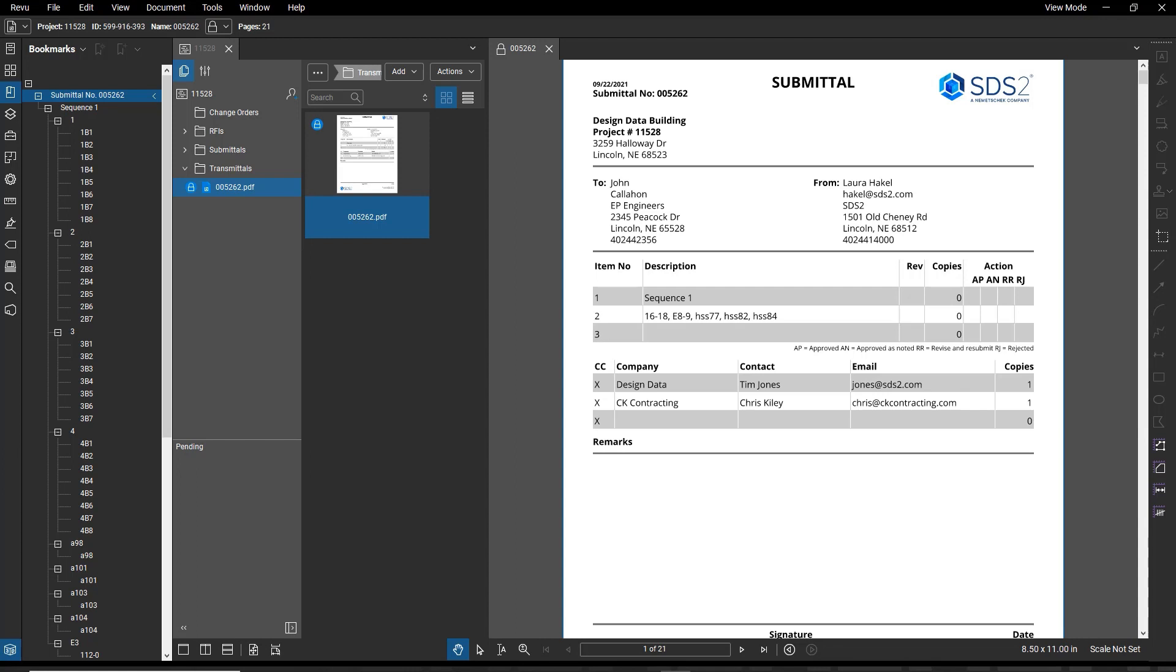The PDF submittal tool has been added to SDS 2 2021 and allows you to export PDF files of different sheets and generate a cover page. It is intended to be used for submittals in Bluebeam Studio using the Bluebeam Studio Prime license.